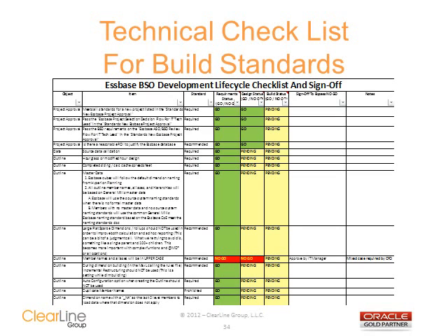This is followed by a go, no-go checklist for each phase. If an item is required, then the project cannot go forward until the standard is met. However, some items are only recommended. The project can move forward with the appropriate manager's signature.